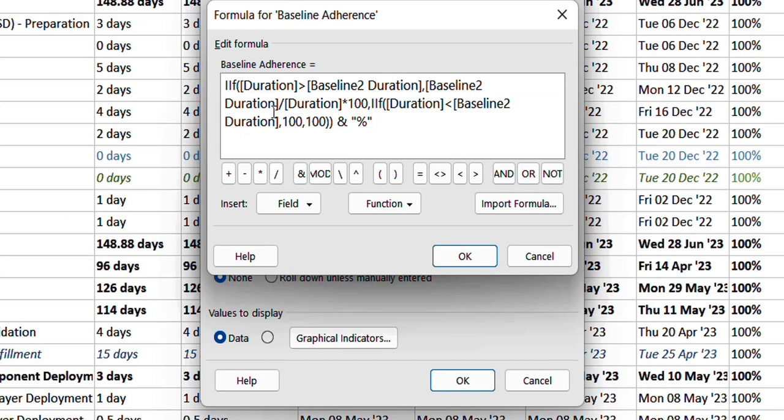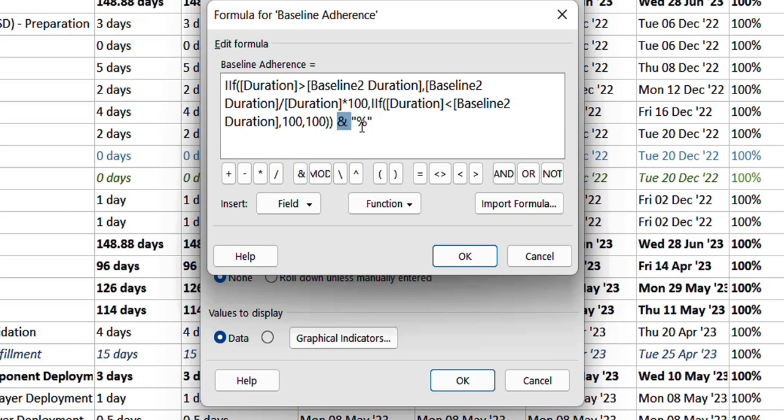If it's not greater, then there's a possibility that the task duration was lesser than the baseline, so it will assume it as 100% because obviously the adherence was good. And if it's equal then it will be 100%, and I concatenated it with a percentage sign.